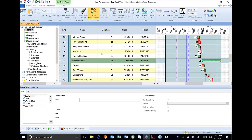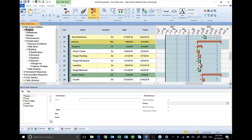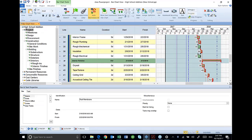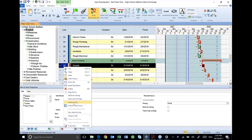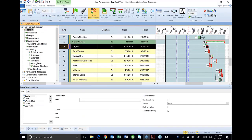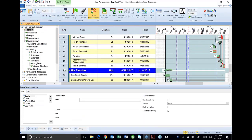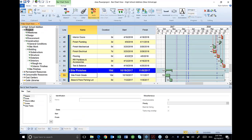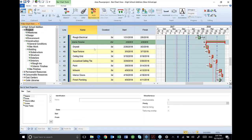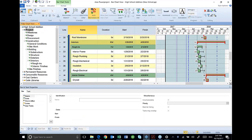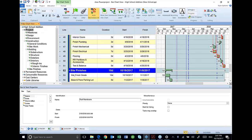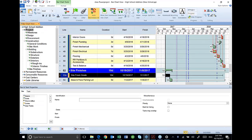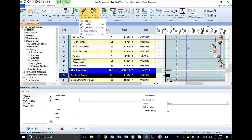My drywall is going to be done with my insulation, but I also want my roof membrane on, so I highlight roof membrane, select drywall, and link them. And then my site finish grade. I'm going to tie that to my roof membrane as well. So I'm going to highlight roof membrane, go down to my site finish grade, and link those tasks.